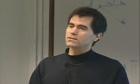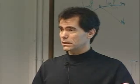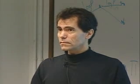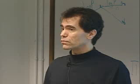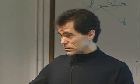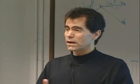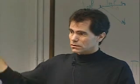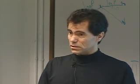Okay, obviously one costs a lot more than the other. So how in the world do you answer that question? Which one should you do, and whether it should be a mix? Those are the very things facing the project that I'm working on now. Not only that, one of the things is, okay, we're trying to get prepared for a human mission, and we want to reduce the overall cost and reduce the risk. We'd like to bring risk forward from the manned lunar mission into the RLEP program and retire it in the robotic program. What that means is if I've got a technology challenge for a cryogenic engine, that means a liquid oxygen, liquid hydrogen engine for the lunar descent, I want to use that same engine, if I can, on this mission to work out the kinks.